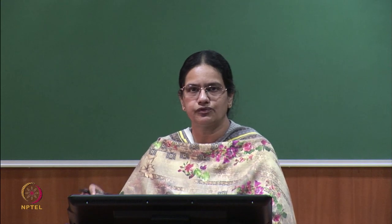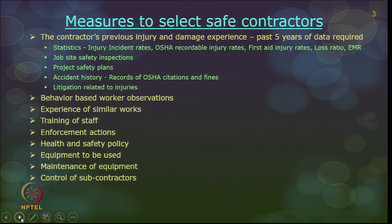During the bidding stage itself, you can evaluate or assess a contractor whether he will execute a project safely. Some metrics you can collect from a contractor for the last 5 years of work experience are: injury incident rates or recordable injury rates, first aid injury cases, and loss ratio or experience modification ratio. You can collect this data from previous projects — maybe for the past 5 years — based on your project sensitivity and seriousness on safety.